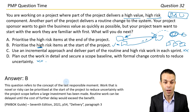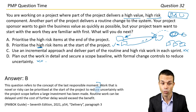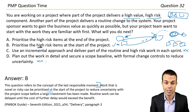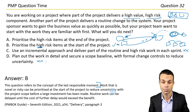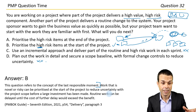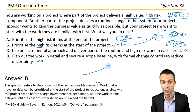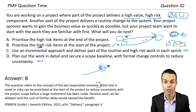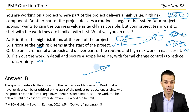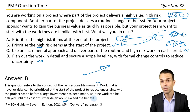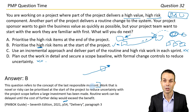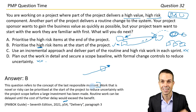This question refers to the concept of last responsible moment. Work that is novel or risky can be prioritised at the start of the project to reduce uncertainty before a large investment has been made. Routine work can be delayed until the cost of further delay would exceed the benefit — delay it as long as possible until it becomes too costly to delay further. Page 54 in the PMBOK Guide under delivery, paragraph three, 7th edition.